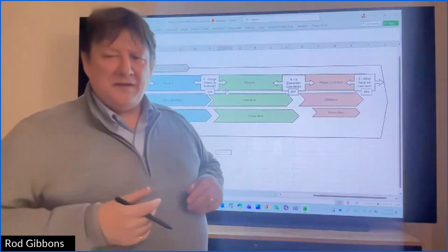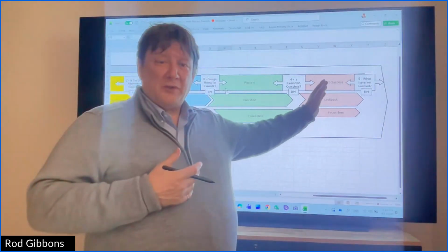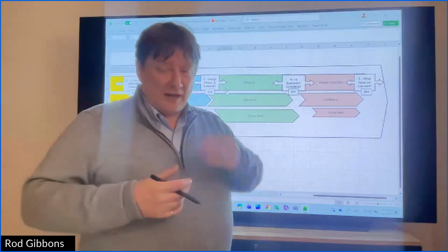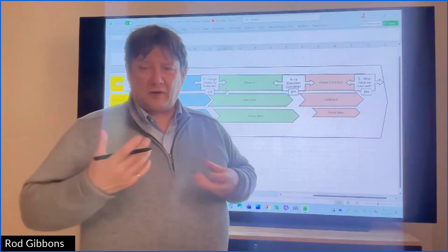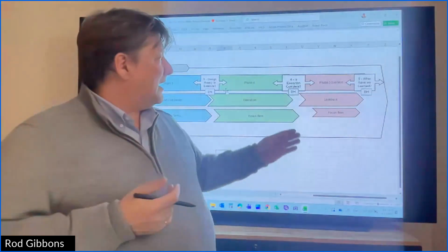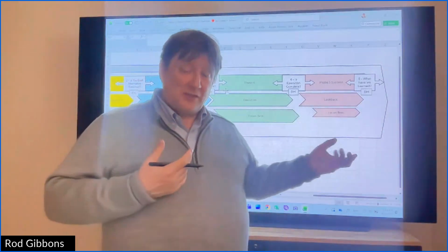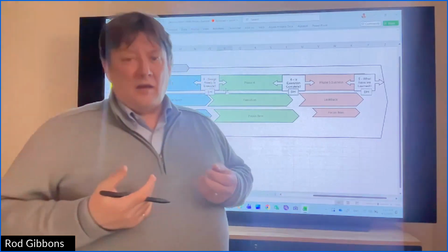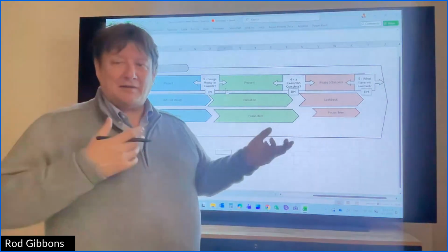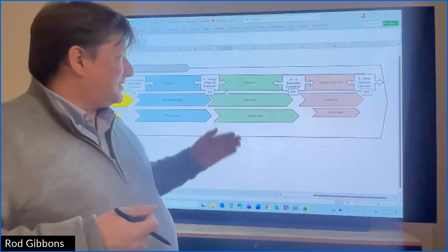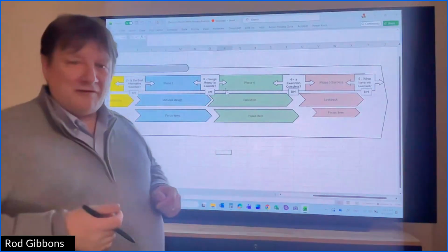Then you go into phase 5, which is, hopefully you've defined success, what you want the world to look like after you've done this project. Then you'll have a success phase, and this is where you look back, lessons learned, best practices, what could have gone better, what could have gone worse, and then again, there's a decision here. What have we learned? And there's a decision maker for that. What have we learned from this project? And if we had the opportunity to do more of these, would we do more, or would we not? Or do we have regret, for example? So those are kind of the 5 phases.